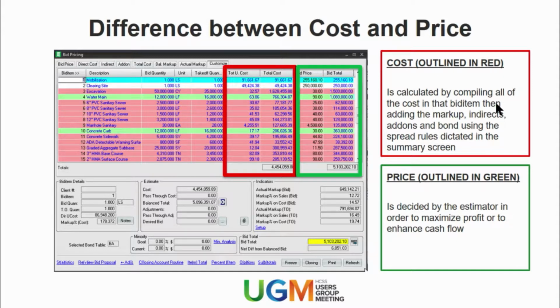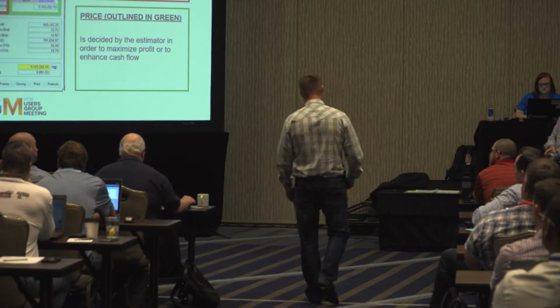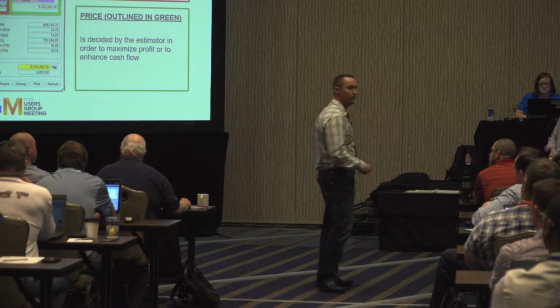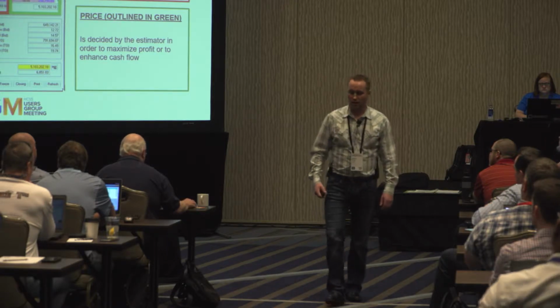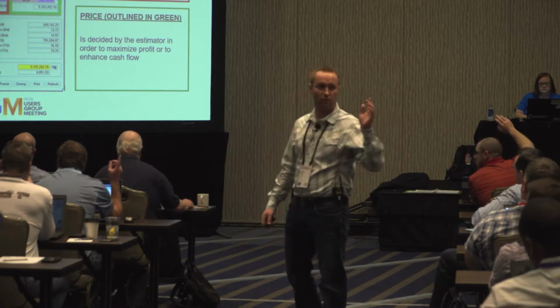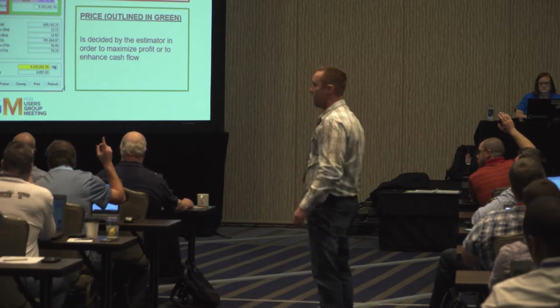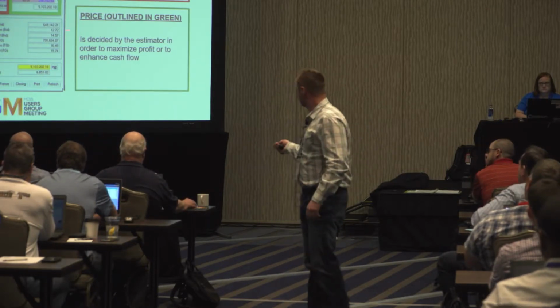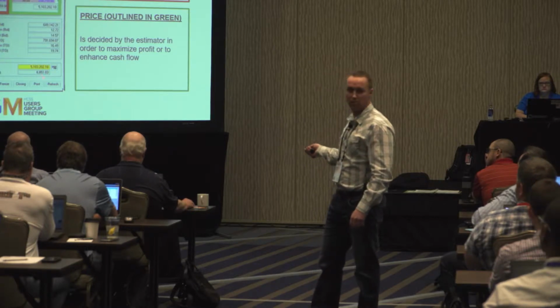So you can see on this side that based on our takeoff quantities, we're only anticipating a cost of $4,454,000. Whereas when we bid to bid quantities, now we're at $5,103,000. So we're projecting a budget of $600,000 in there of quantities that we do not believe exist. So how many people here are using takeoff and bid quantities? How many people have red and green on their screen when they're pricing? How many people here have submitted a bid where that net difference is a big negative number?